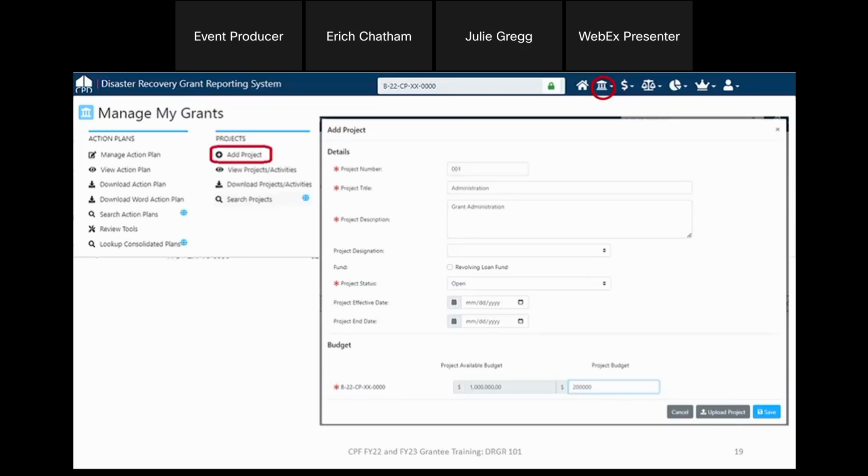That being said, you may have projects where some of you are doing acquisition of sites. So maybe the acquisition is to occur in the first 6 months, then construction from month 7 to 18, for example, and then occupancy for those of you doing residential or otherwise facilities, maybe phase 3 longer term. So you can use those project effective start and end dates to correspond with your project timeline. Again, not everyone has similar funding programs, so this is different or unique for each jurisdiction or grantee.